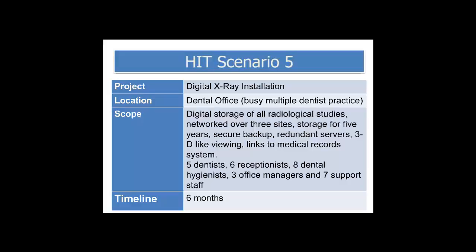So your team's going to have administrative staff, some clinical staff on it. Probably at least one of the providers needs to be there to be sure that you're meeting all of the objectives for the providers. You'll need to have one of the receptionists there so they can talk about what they do on the front end, and also you'll need some of the billing personnel there so you can talk about how they're going to interface with this system and how the bills get out the door, so that you need to understand the workflow really from the beginning all the way through till the end.